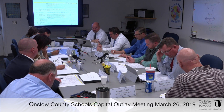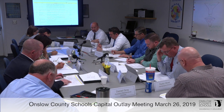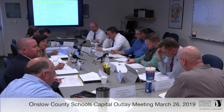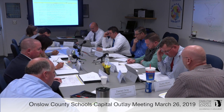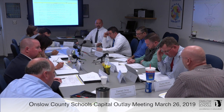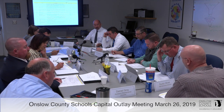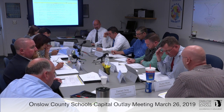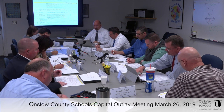Okay, replace HVAC equipment, replace gym air handler unit. That's put in this every year. We had funds a few years ago to replace that one and Southwest Middle, and we ended up having to use pretty much all of the funds we had for the one at Southwest Middle because it was in worse condition for the gym. And so it does need to be replaced. It's very expensive. Okay, 3A. So that's an A.